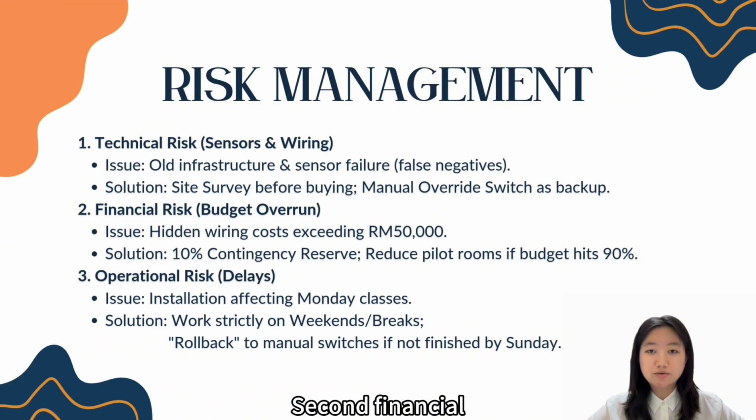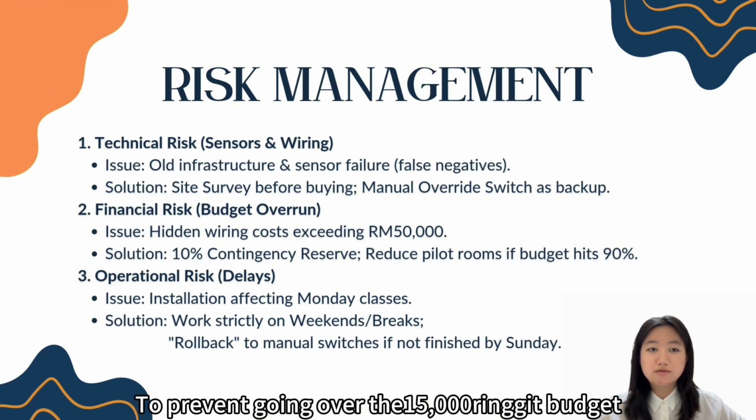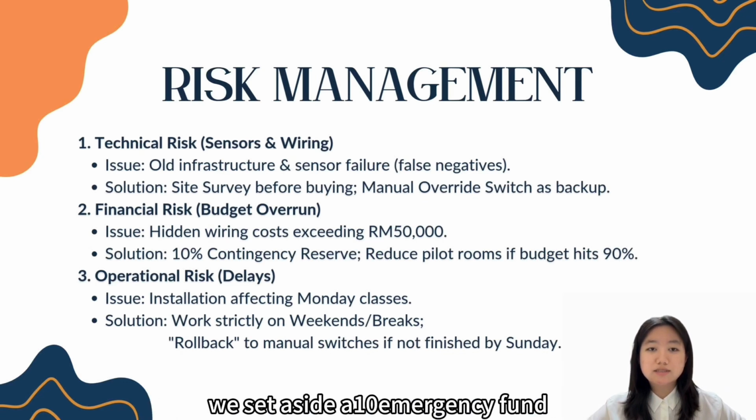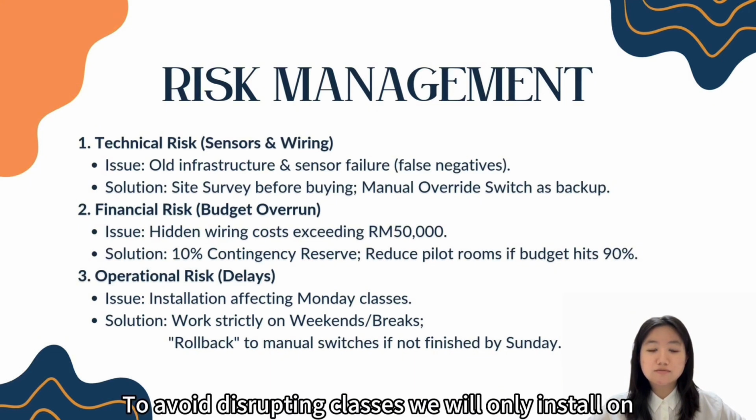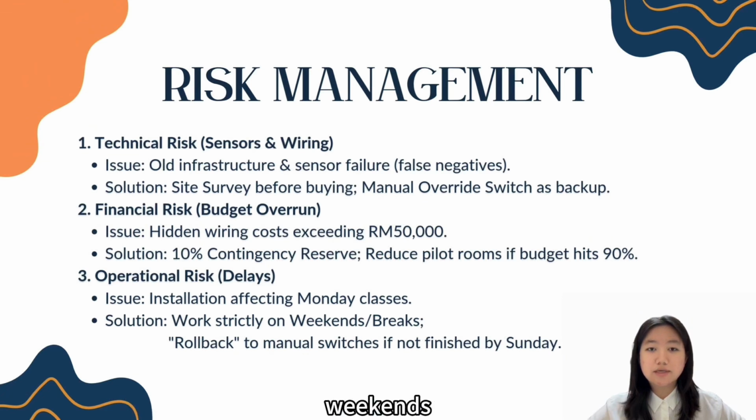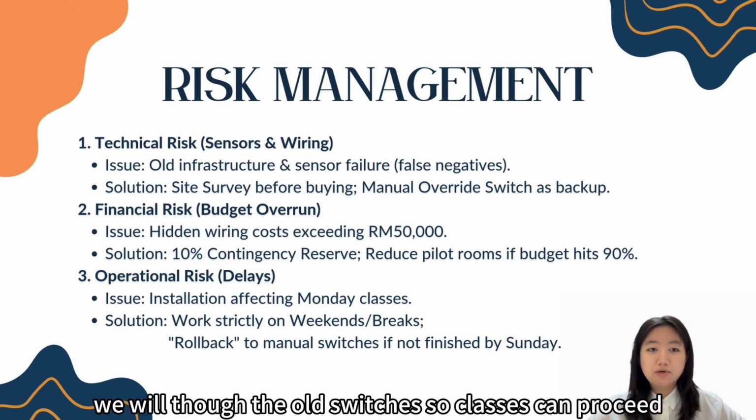Second, financial. To prevent going over the 15,000 ringgit budget, we set aside a 10% emergency fund. Third, operational. To avoid disrupting classes, we will only install on weekends. If we don't finish by Sunday, we will restore the old switches so classes can proceed as normal.